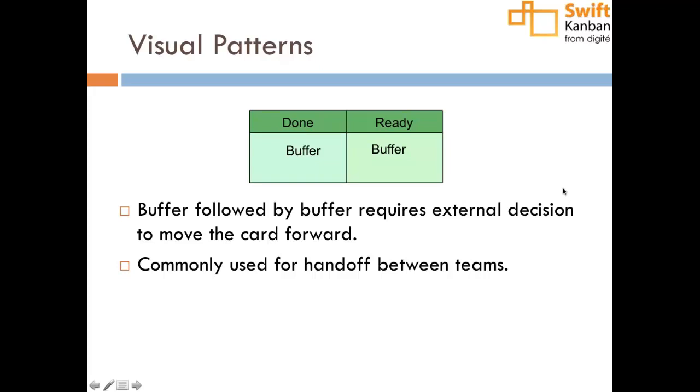And so he or she can go on to do other things. That's the point where you can reprioritize your work, as we'll talk about immediately in the class of service area, where you can switch what you prioritize to work on without actually getting into a multitasking situation and losing productivity. So one other thing that Kanban allows you to do is be very dynamic about how you prioritize. In the next seminar, we will talk about the consequences of doing that. But that allows a much finer control over prioritization of work.